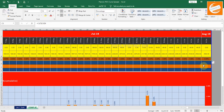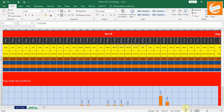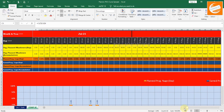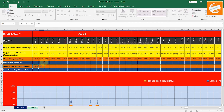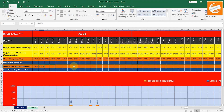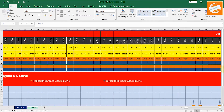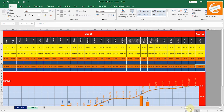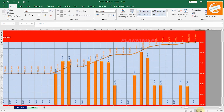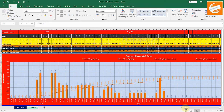You can see the daily planned manhours here. For generating the planned manhours curve, put the same formula as above — equal to this cell — then the next is equal to this cell plus the previous one, and drag that formula to the end. If the cumulative value reaches 100%, your formula and values are working correctly. You can see 100% here, and your planned curve has been generated using that formula.